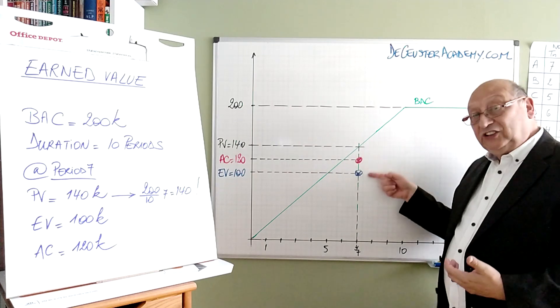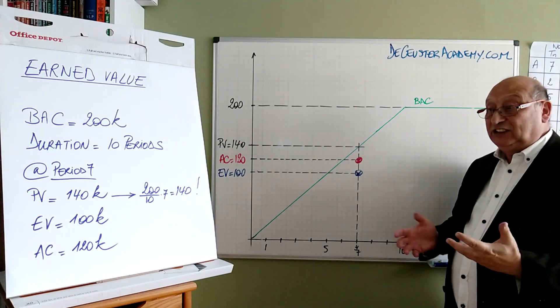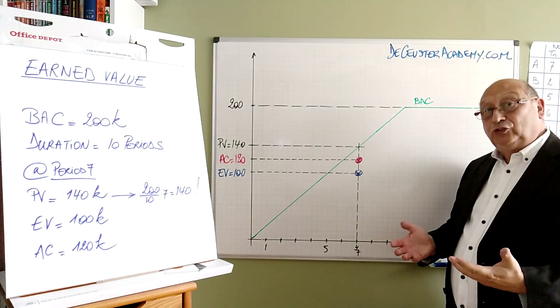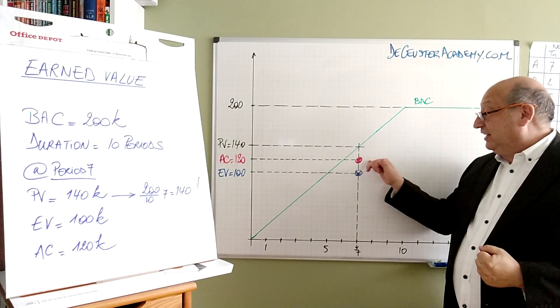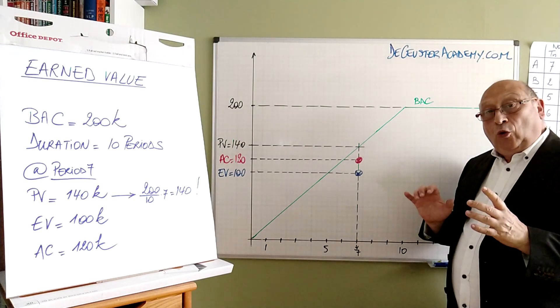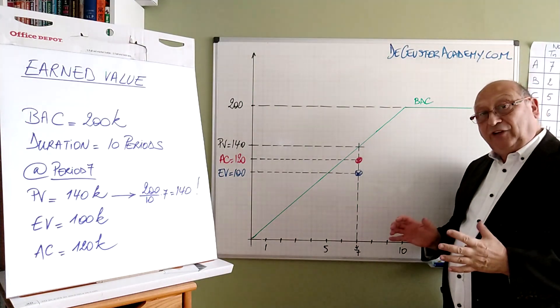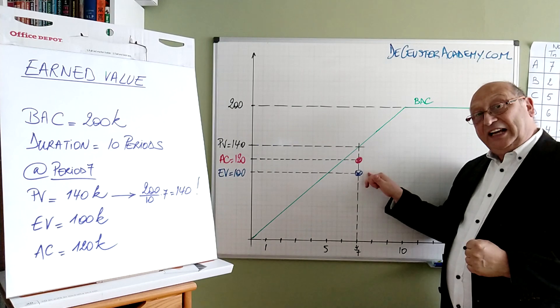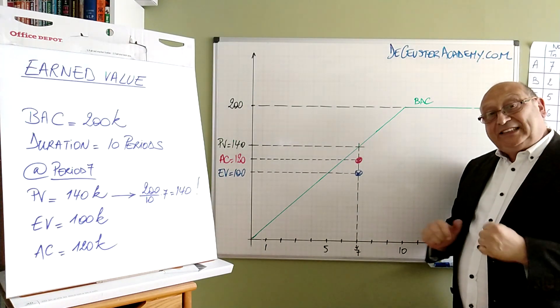And this difference is the schedule variance. The second parameter that we have, and that's typically the parameter we've been using before, is the actual cost. And the actual cost here is 120k. What can we conclude here? We can conclude that we are behind schedule and we are above budget.